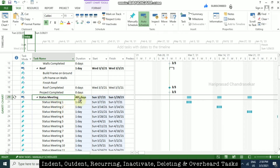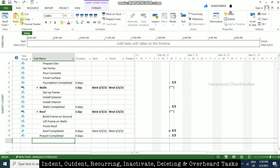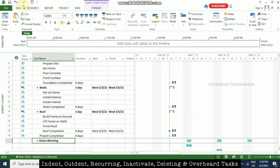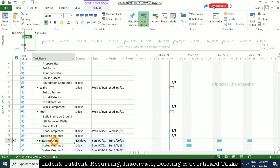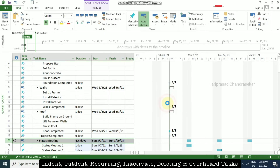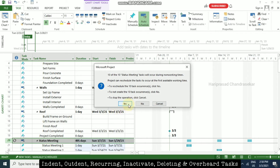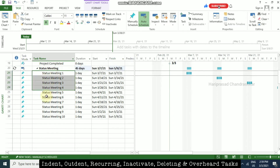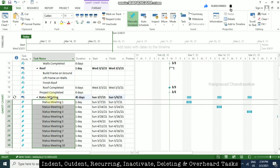If you want to change the occurrences, you can hit Undo and then double-click the recurring task to modify it. For example, I am going to put 10 occurrences and click OK. It will ask you something — put Yes. Now we have 10 occurrences total under status meeting.